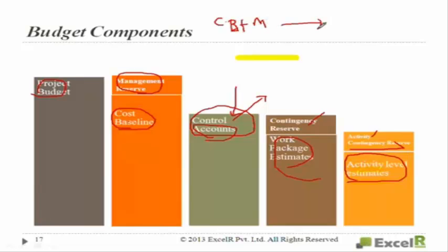But you should always consider that you have only this money, the cost baseline. And whenever you are reporting to your managers or to your customer, you have to report against the cost baseline. You should not consider the management reserve.